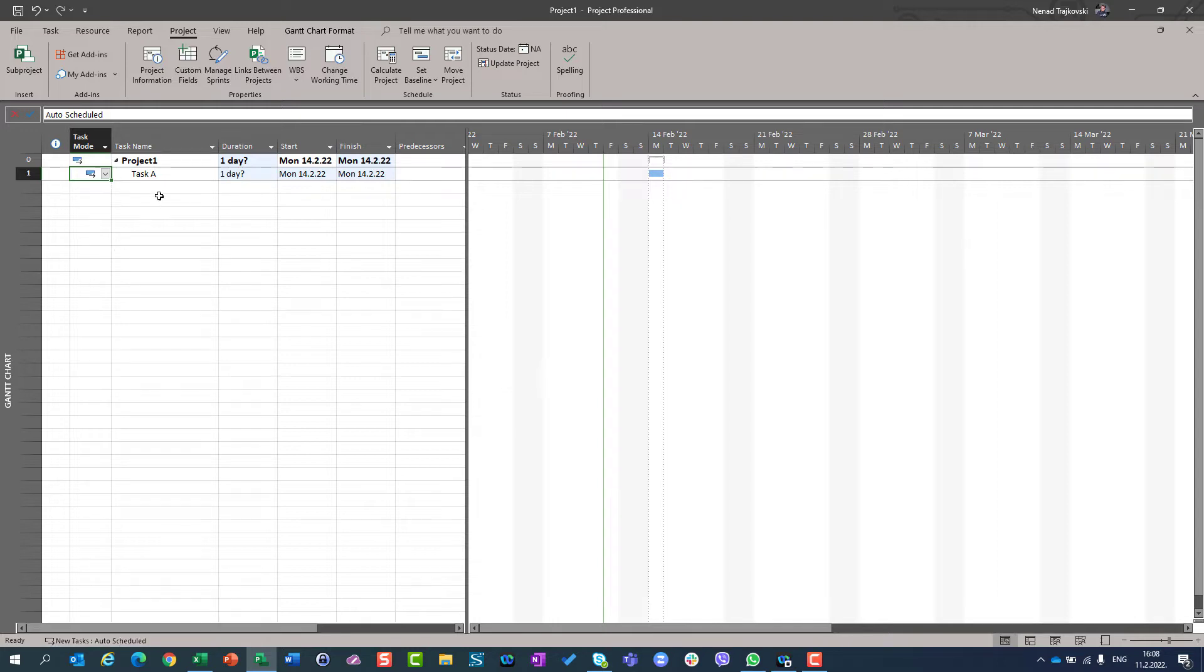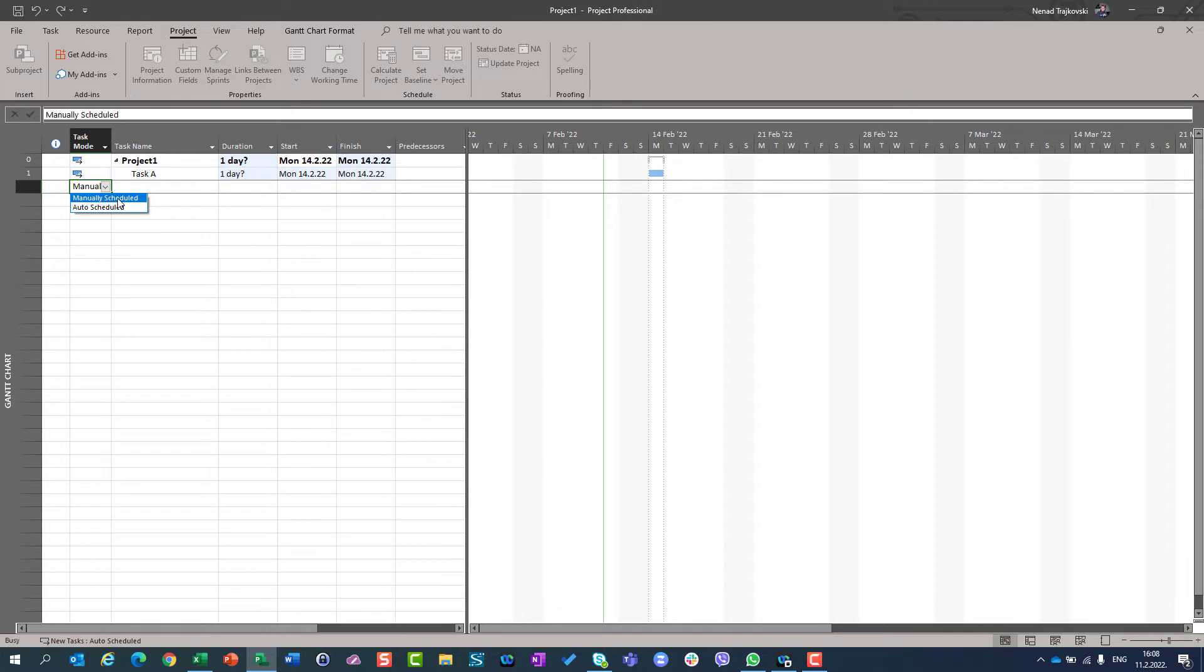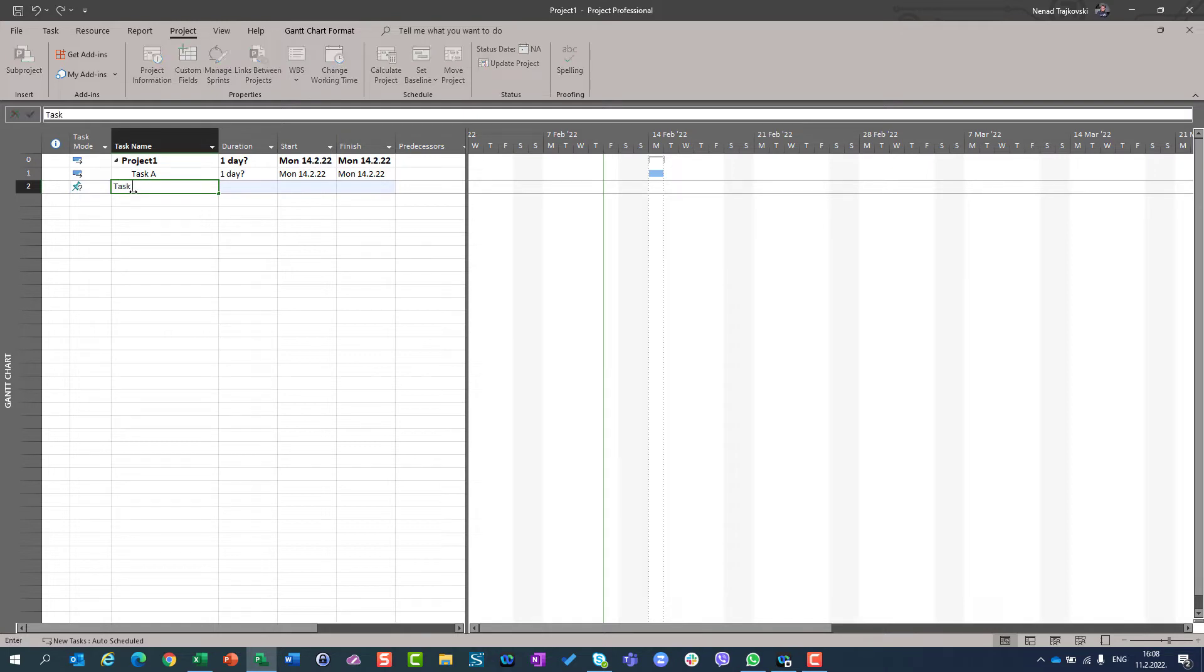But if I want, let's say, to make task B in manual mode, then I can go here in task mode, I can choose manual schedule, and then you will see the difference between this pinpoint. This pinpoint means that your task is going to be in manual schedule mode.